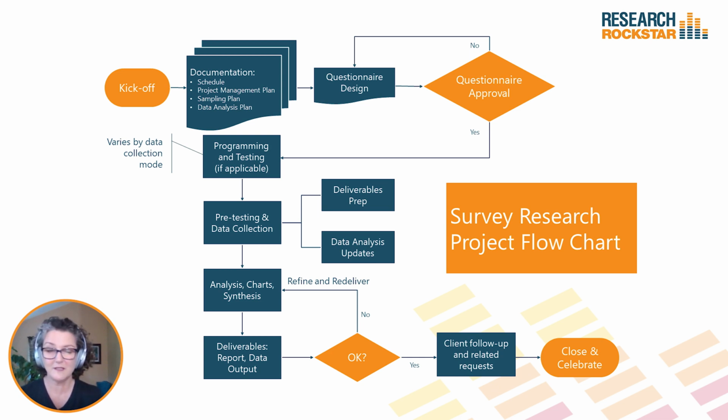Now, the amount of time you're going to spend in data collection can vary widely and wildly, depending on what type of research you're doing. Are you doing consumer or B2B? Are you doing one country or multiple countries? Are you doing research that is going to have to be done in phases? That is, you're not going to do all of the data collection at once. You're going to do one phase of data collection, review the results, and then go to the next phase. So there can be a lot of things that affect the data collection time period. In a lot of cases, it's going to be 1 day to 5 or more days to do data collection.